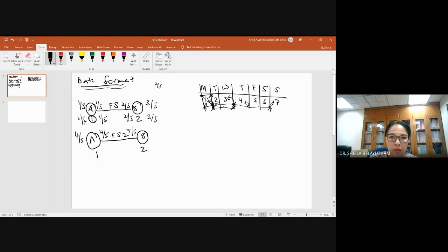Okay, so 4 days, you finish 4 here. 2 days, okay, so it shows the start of 7. So you want to find the start. So plus 2 days, 1, 2, it will show 8. So you finish 8, below here. Okay, so the calendar, it will be Monday here again. So 1 day, 2 day, you will finish Monday 8.